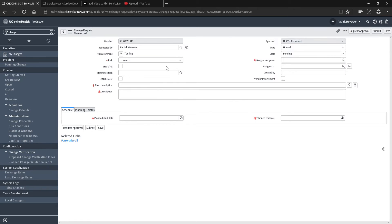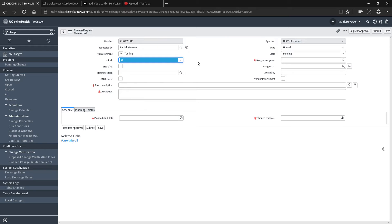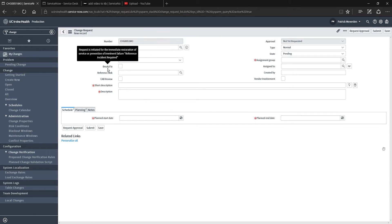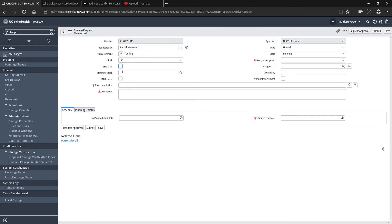Back to this specific change example, go ahead and select your risk level. Break fix basically means you've initiated the change to resolve an existing service interruption. When you do this, you don't need CAB approval, but the change will be sent to the CAB board to review after the fact. If you select that, make sure you reference the incident number.